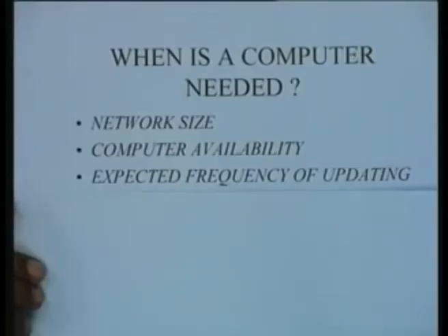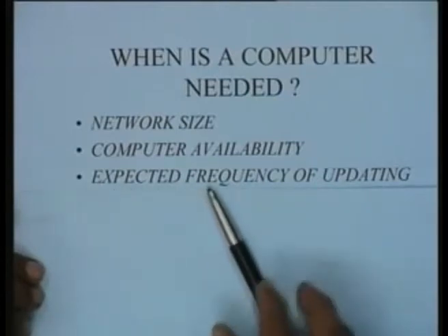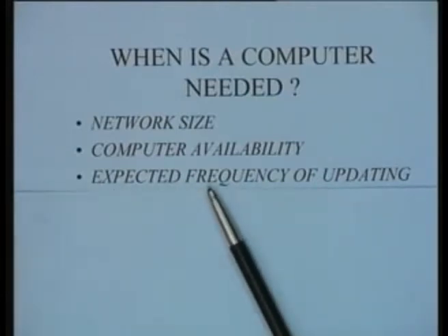I think another very important factor in determining whether a computer is really needed or not is the expected frequency of updating. That is, how frequently are you going to make your project reviews, and based on each review, are you really going to update the information pertaining to your network?